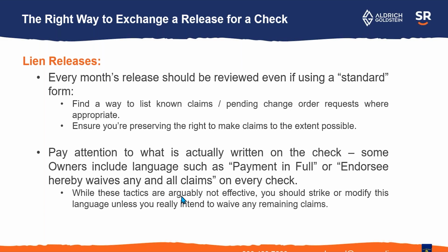And then finally, pay attention to what's actually written on the check. We have seen some people include language such as payment in full for all work, or the person endorsing the check hereby waives any and all claims. That's kind of a little last minute trick. Most people don't do that, but I have seen it before, so just be aware of what the language is, not only in the release, but also on the check.